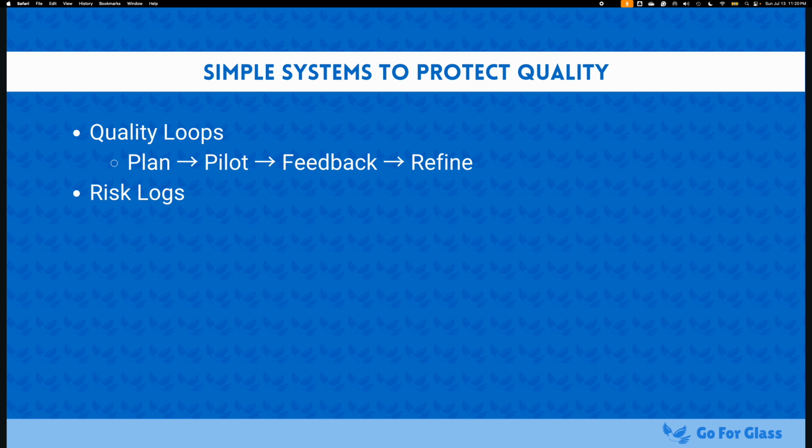For every single entry, as you're going through and reviewing the risk log, you're going to ask yourself, is this risk still present? Has this risk already occurred? And do we need some sort of guardrail or some sort of fallback? Do we need an established plan? Especially if you are wanting to use this as a prop, this works for project management.